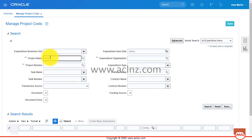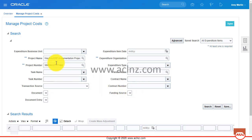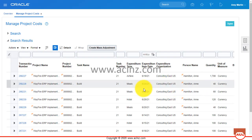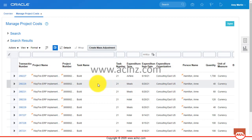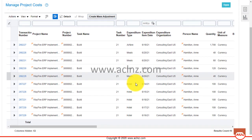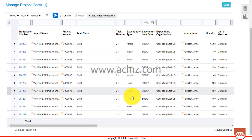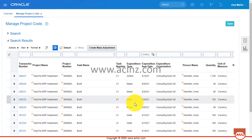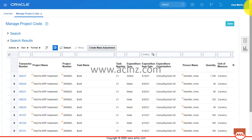Here I would query to see whether the timecards have been charged to the project or not. I'm going to enter my project name and number and hit the Search button. As you can see, previously charged expenses are shown here — such as airfare, meals, and hotel expenses — but not the timecard. So the timecard has to be imported.